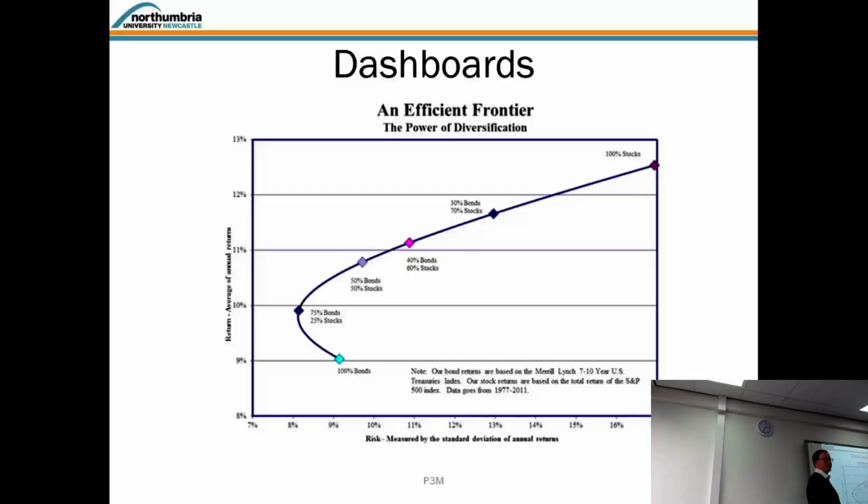And then you have 10%. This is not that profitable. Yeah, and then if you have one that runs over, you have a look at how often they run over. This is how you arrive at your probability of something going wrong. And then you can log that against your project selection criteria or types, the project that you're doing.